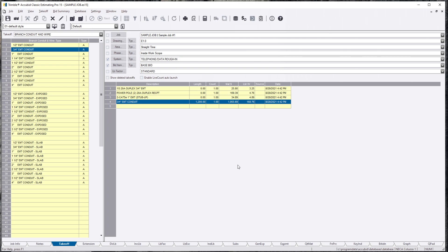Here's the thing: if you change a job to make a column 2 or column 3, that is going to apply to every single item that you have in your extension. Does not make any sense. You just blew yourself out of the water. You are not going to get that job.